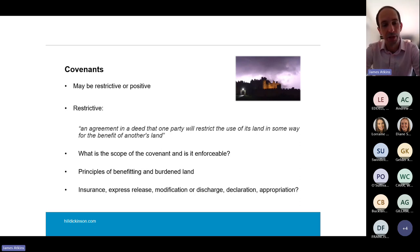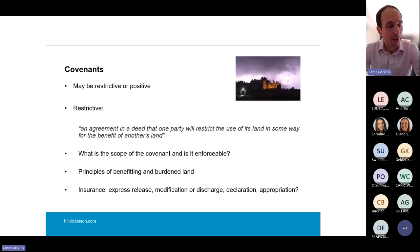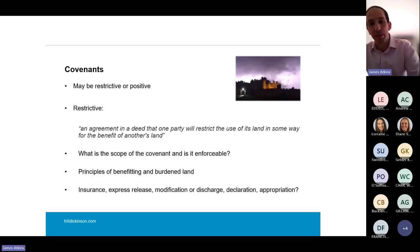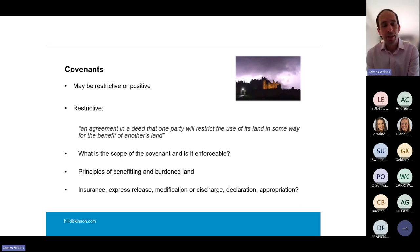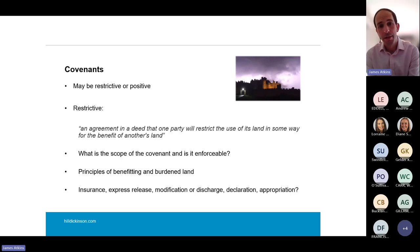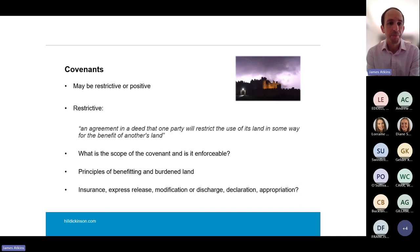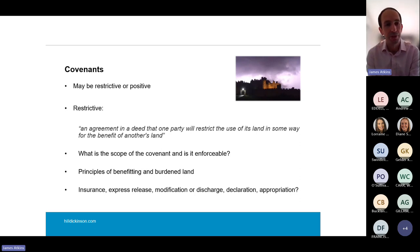You can also apply to court for a declaration that the covenant is unenforceable. There are complex rules that need to be applied and you can ask the court to clarify your interpretation and make a declaration that the covenant cannot be enforced. Finally, there is appropriation, where a local authority can effectively CPO the benefit of the covenant. That's only helpful if you've got a local authority partner, but it can provide a useful threat to someone seeking to hold up a development because they have the benefit of a restrictive covenant.